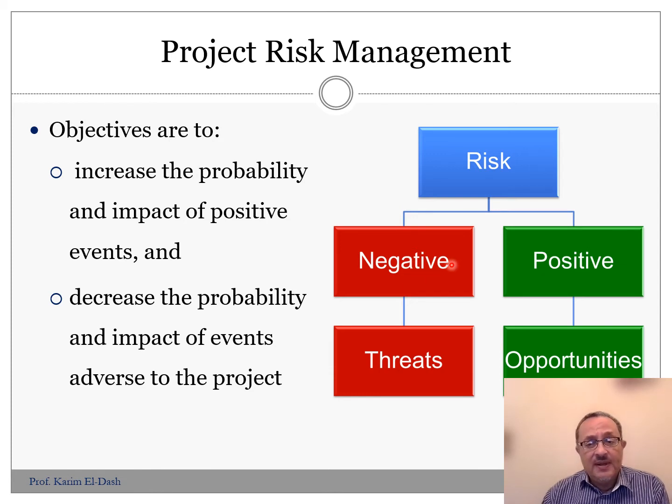That's the responsibility of the planner, not the risk manager. We are talking about unexpected increase in the prices. So 1 or 2% is expected and should be considered by the planner. If it increases like 20%, 25%, 30%, in this case, that's a big risk.